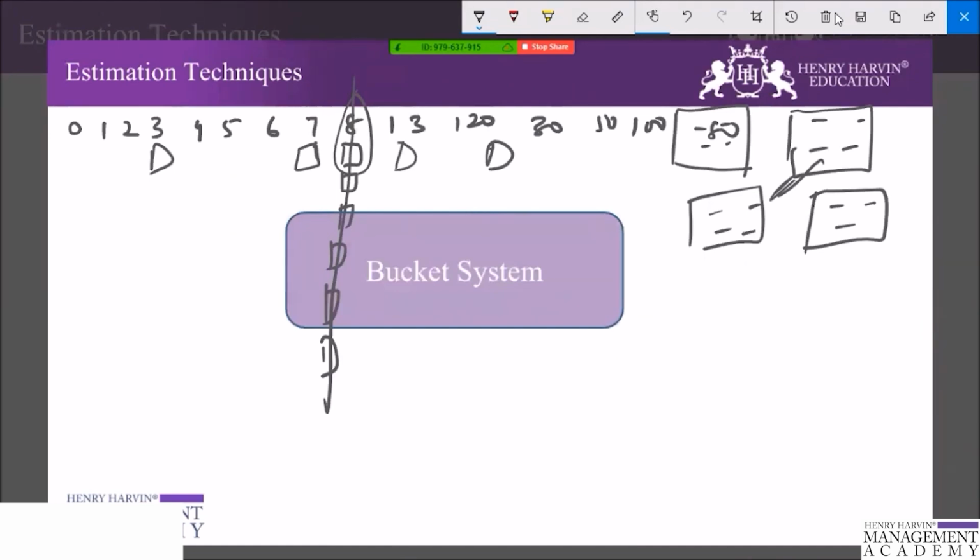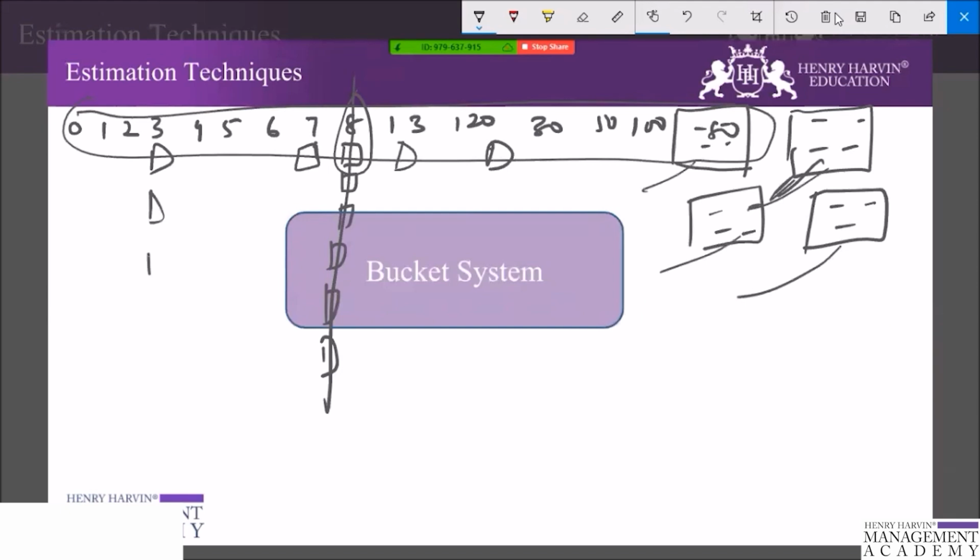Once it is done, then choose the third item at random, and after discussion, once consensus is reached, place it in the appropriate bucket. So this is the bucket which you have created, and once this bucket is created, you can put the item in this bucket depending upon the consensus that is reached, because you are going to create the buckets from all the items so that every item can be placed in one bucket or another.